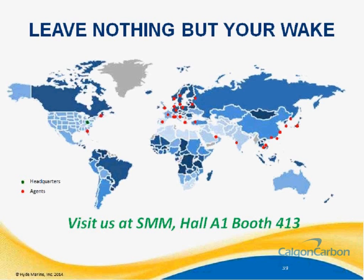Do ballast tanks need to be cleaned before commissioning? Yes. Typically, as part of the installation process, all sediments in the ballast tanks should be removed. And this is largely because organisms can remain inside the sediments, particularly larger organisms than would normally pass through the primary stage filter. And those organisms, because on discharge you wouldn't normally use the filtration stage, can contaminate the samples, particularly if you are taking initial readings at the initial discharge in order to ensure that your system is operating.